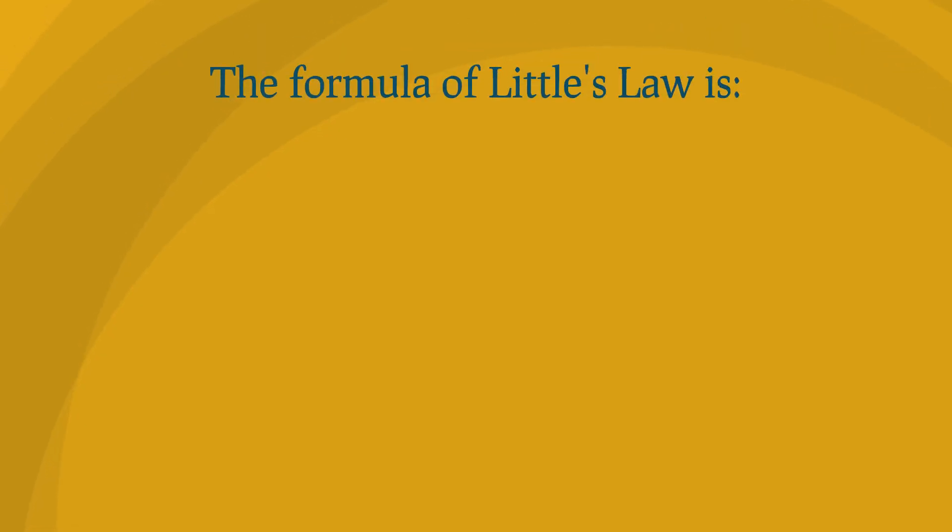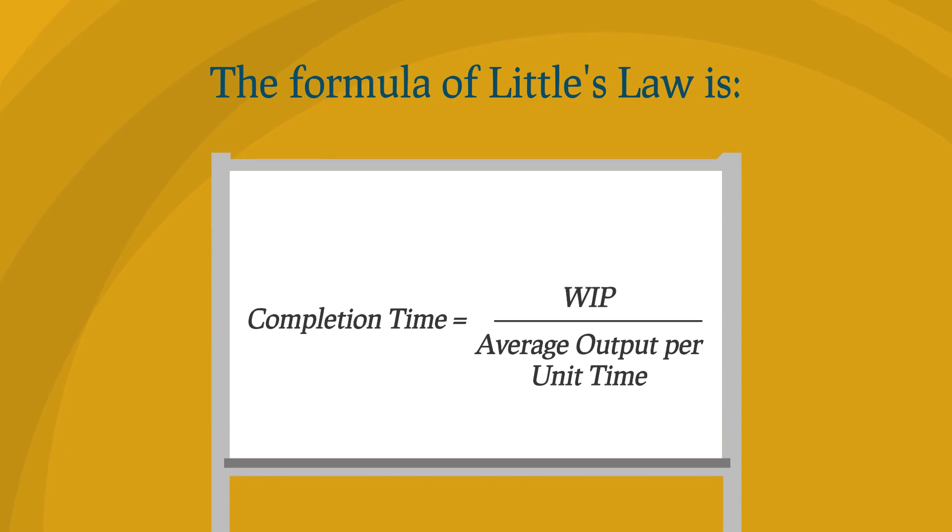The formula for Little's Law is: Completion time equals work in progress divided by average output per unit of time. Average lead time equals work in progress divided by completion rate.